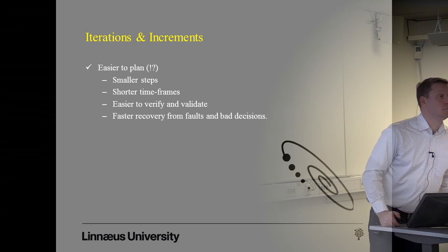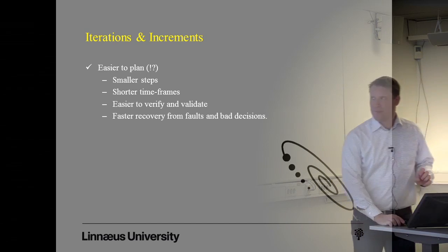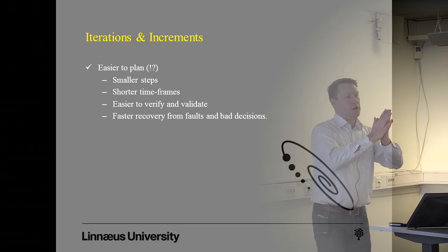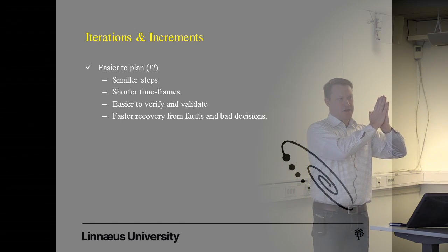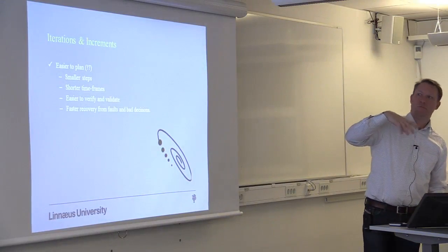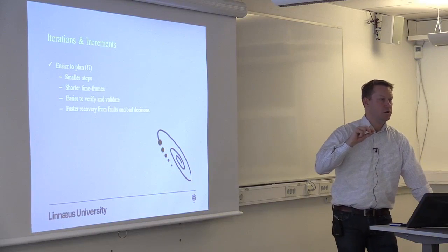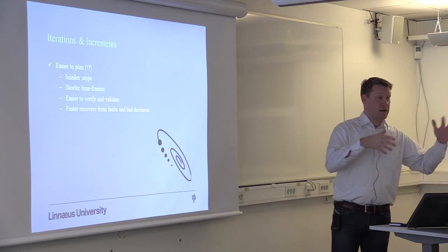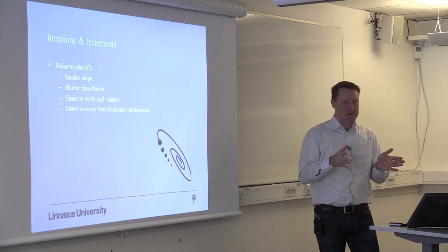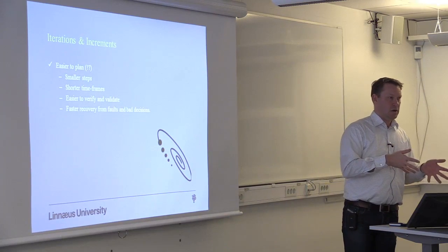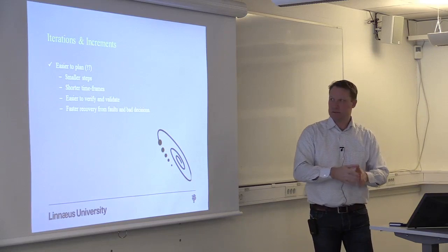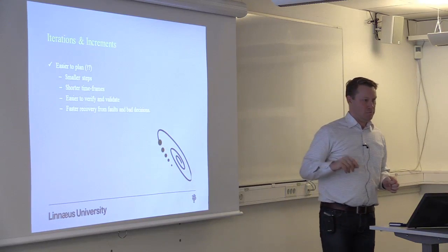Question: is this part of the waterfall model? I would say that the waterfall model's intention was that you have a number of steps that you have to go through. And some people say that iterations do not exist in the waterfall model. That's not true. Of course, you go back and do it again. But the waterfall model is more milestone driven. So the focus there is not iterations and increments on the product. It's more about delivering specific documents. So it's not incremental, but it can be iterative.